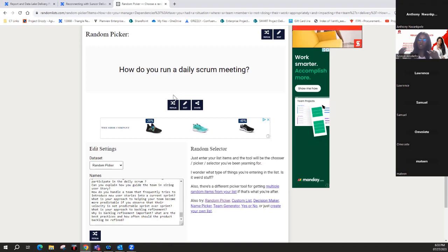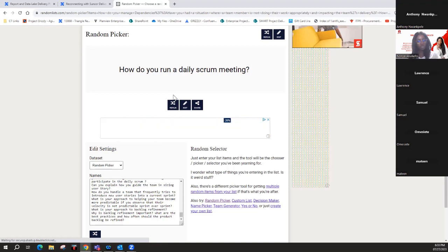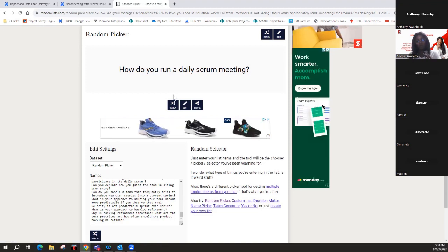If I observe that somebody is taking too much time for their update or talking about something that we cannot resolve, which could potentially take time on the call, I will interject carefully and encourage them, saying, this is a great conversation, but we can't solve it on the call because we only have 15 minutes. Can we take this away after this call to discuss it further? Maybe after everyone is done and we have some time, we can discuss it, right?